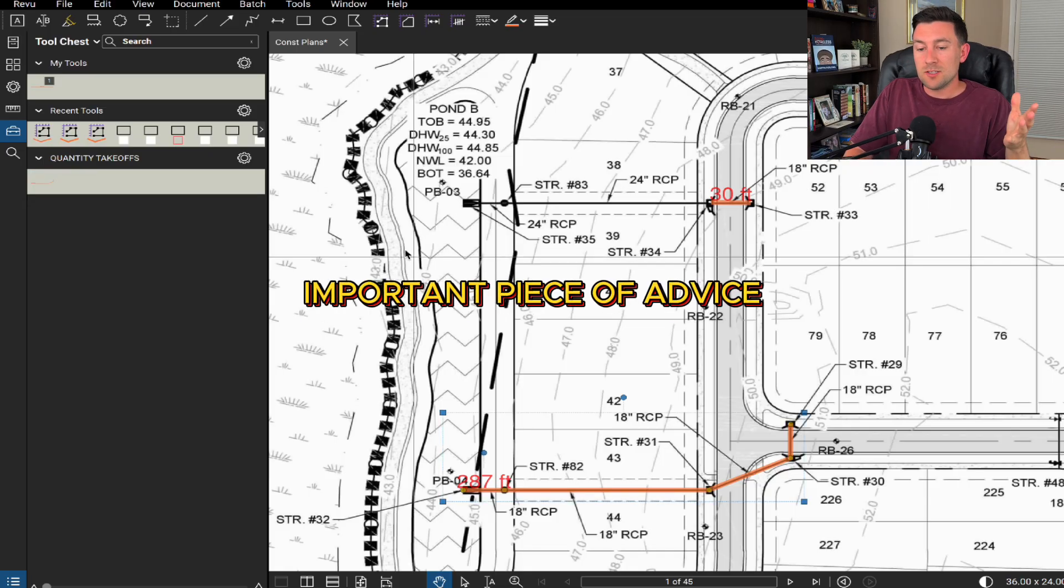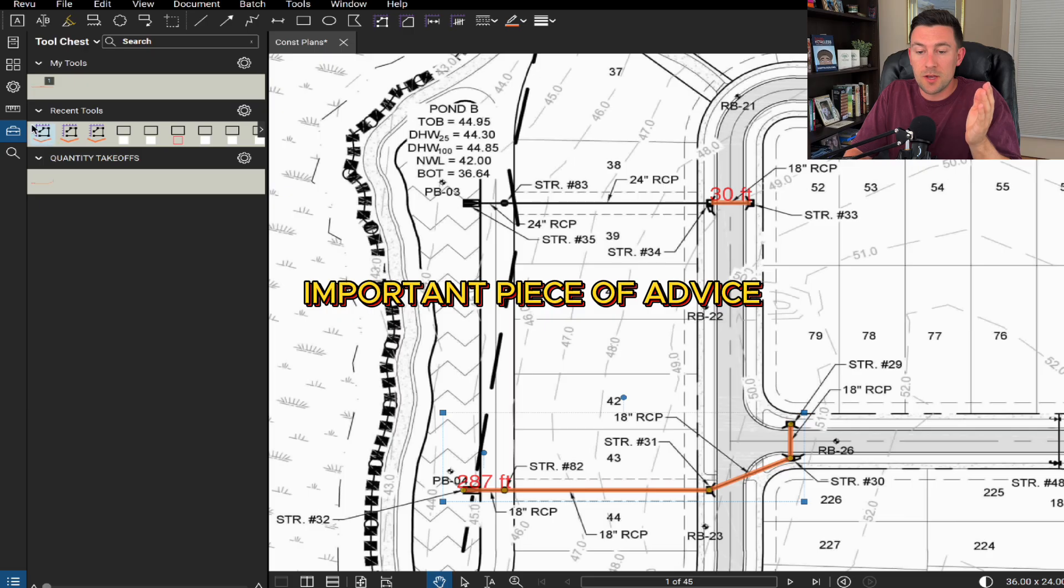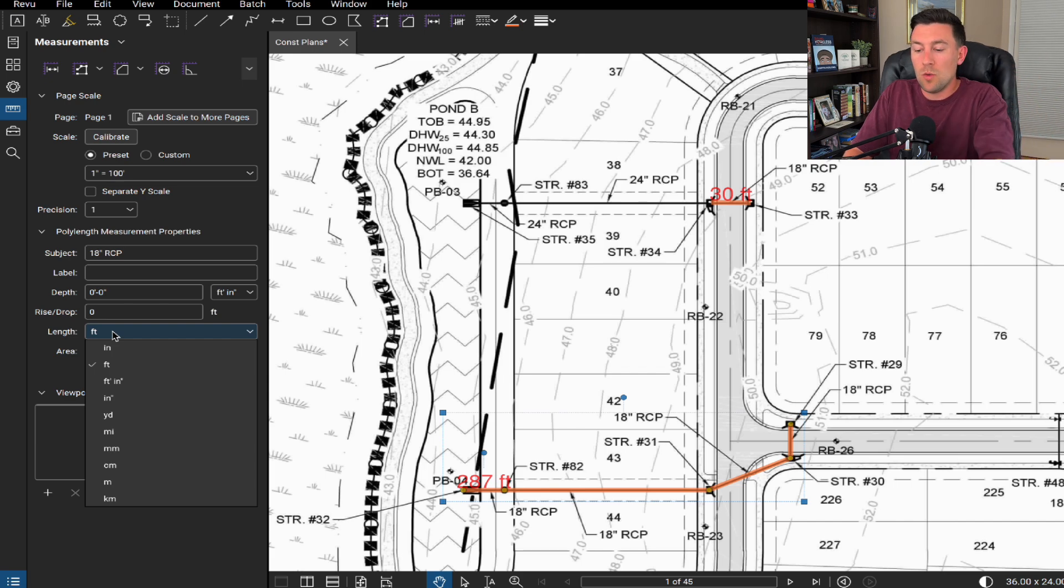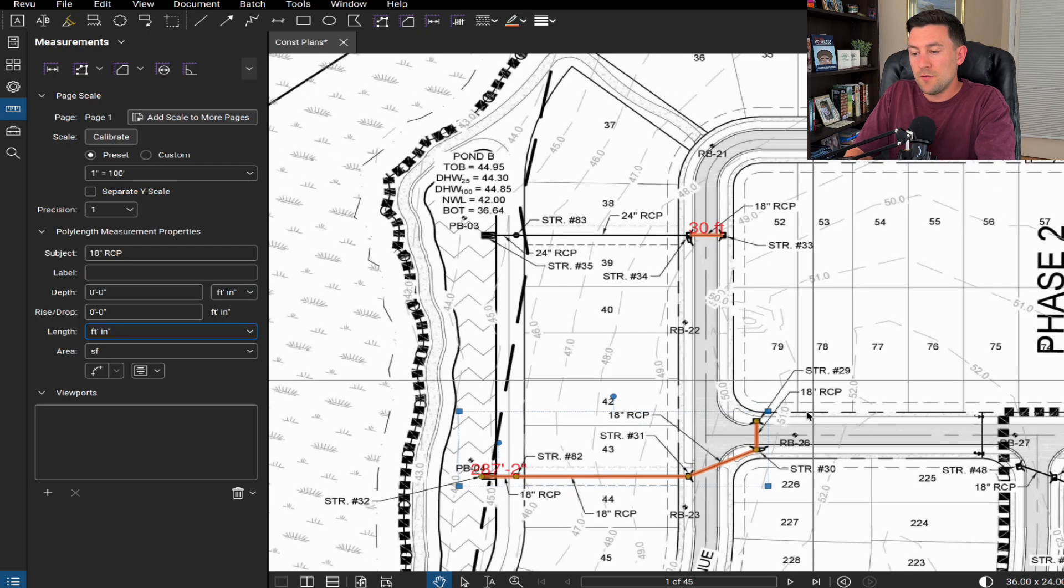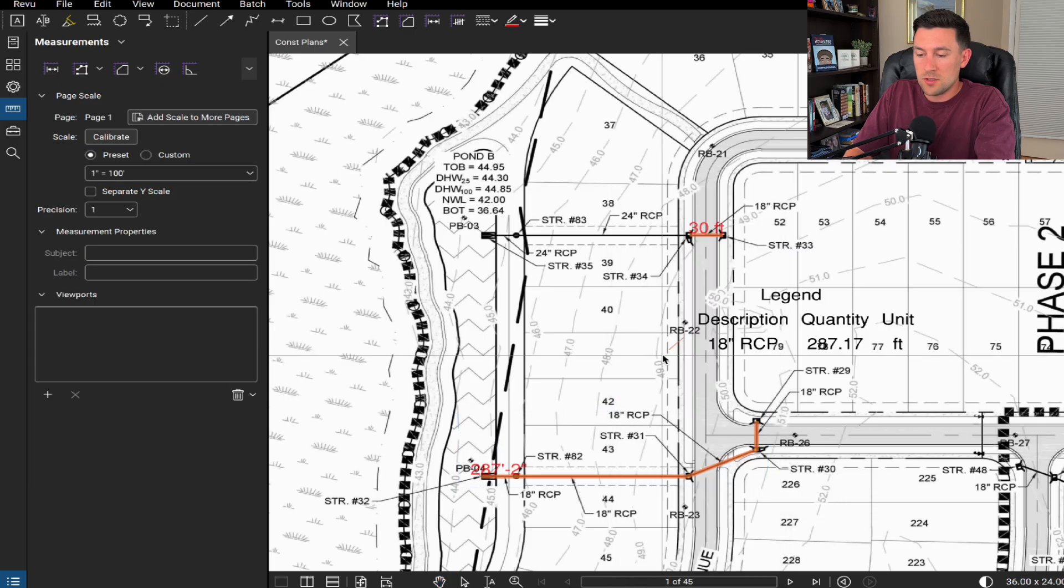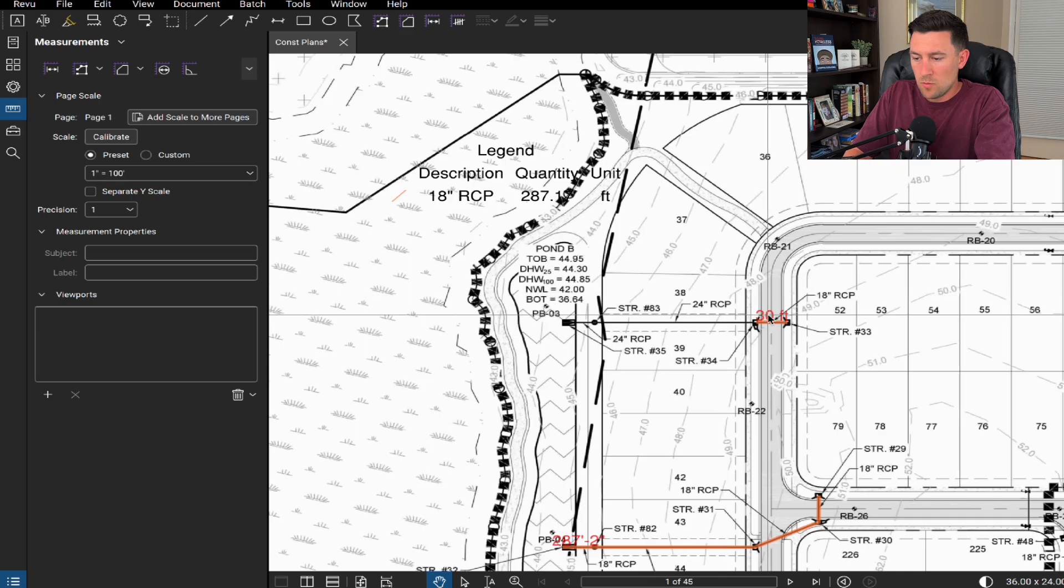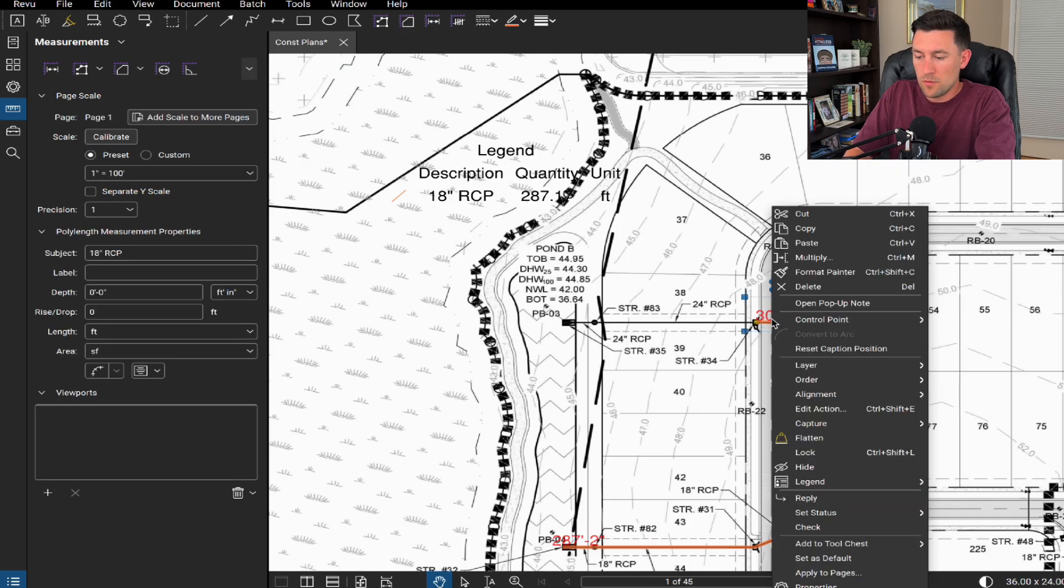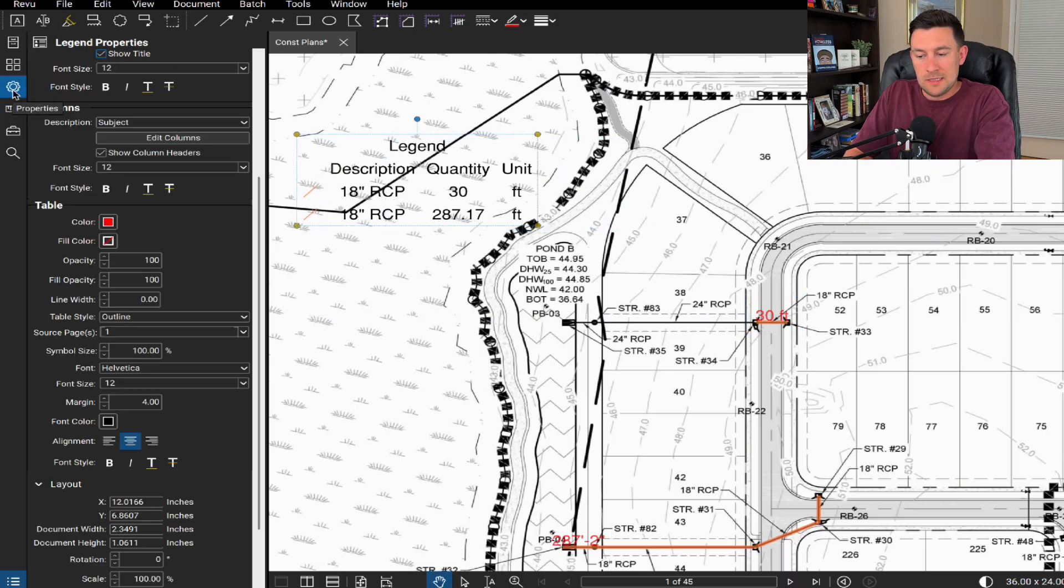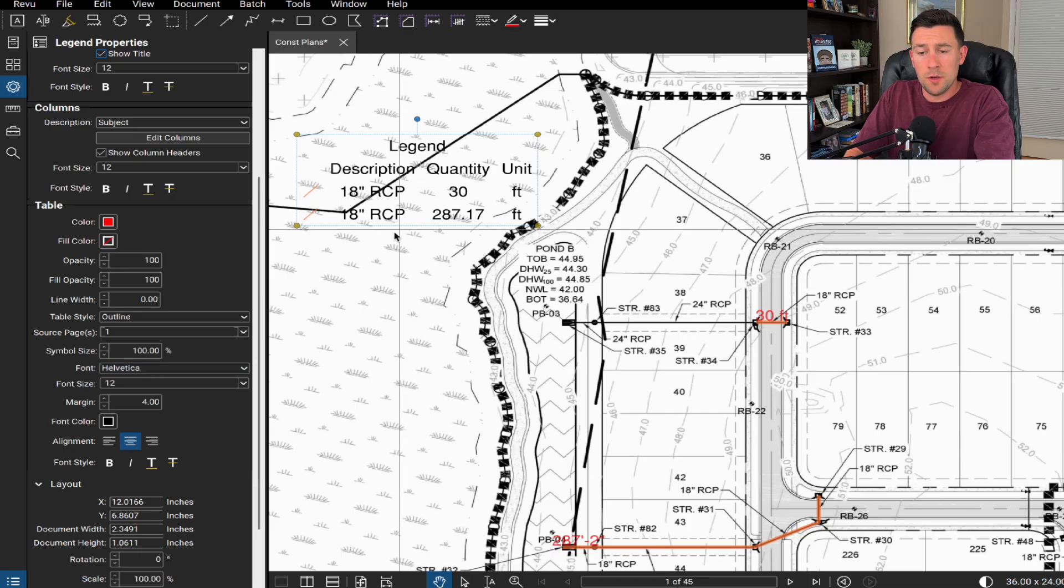Now one piece of advice with this, the reason why I did that is because let's say if I had a mix of measurements that was using feet and inch and then feet, it would break up all those separately on the legend. And I really, really don't want that. Let me actually show you what I mean. So now let's say if you were ready to create a legend, you can right click, you can do a legend. Let's do create new legend. I'll put that right here. And then watch this. If I were to go click up over here, add this to the legend. Do you see how it makes it separate? This is something that you don't really want. You just want everything tallied up. So that's just one thing to pay attention to.